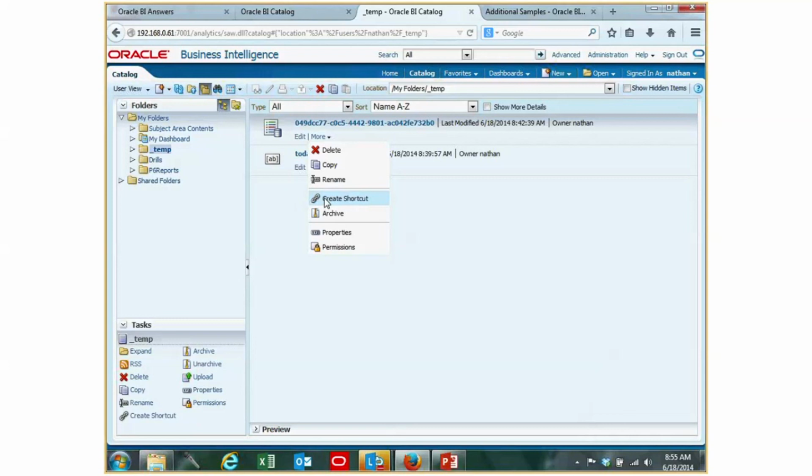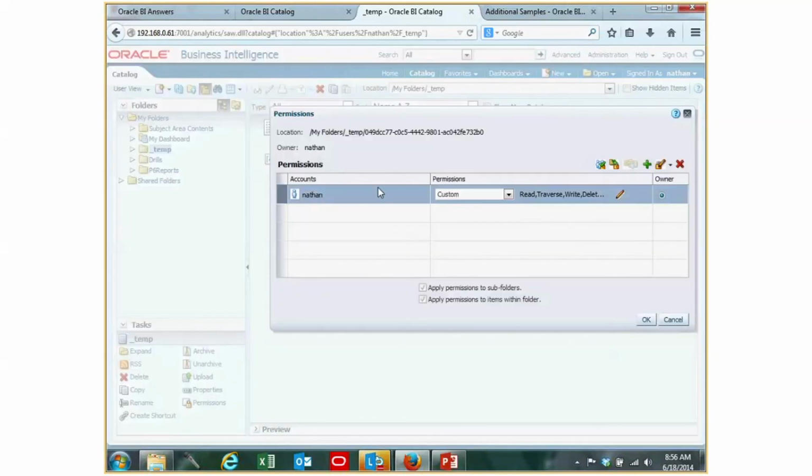If I don't have permission to see a project, I can't see the project. It's whatever you can see in P6, as long as you have the analytics module checked, you can see in there. If you can't see it in P6, you can't see it in there. But that's a good point to bring up too, because that's talking about the project data that comes from P6. If you want to do another level of permissions within analytics, that's also available. So if I don't want you to see that report, or I just want to do it for myself, you can go in here with the permissions and assign them as well. So reports, everything you build in analytics, you set the permissions up in analytics. All the project data, all the information that comes out of the ETL, that's all set up through your EPPM environment.